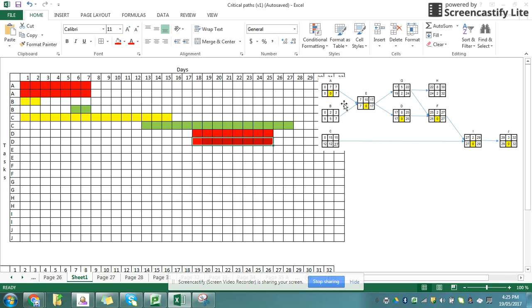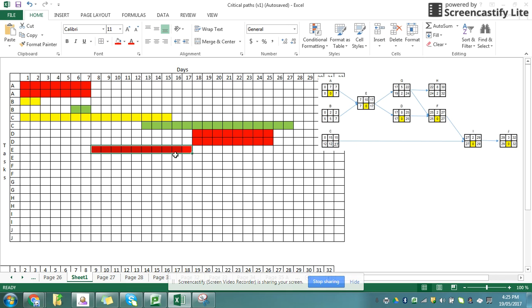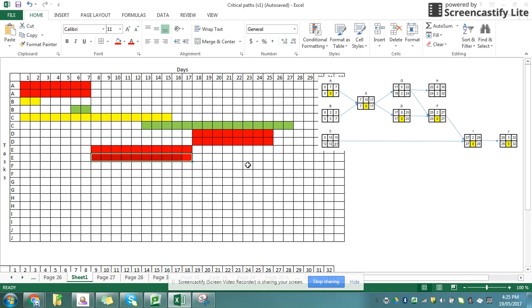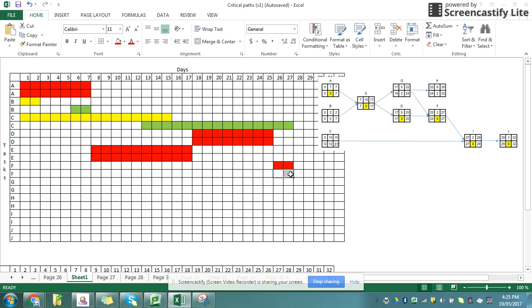Task E starts at 7 and finishes at 17. So task E starts at 7 and finishes at 17. Again, I know that's one of my critical paths. And task F starts at 25 and finishes at 27. So starts at 25 and finishes at 27. And again, I know that's a critical path.